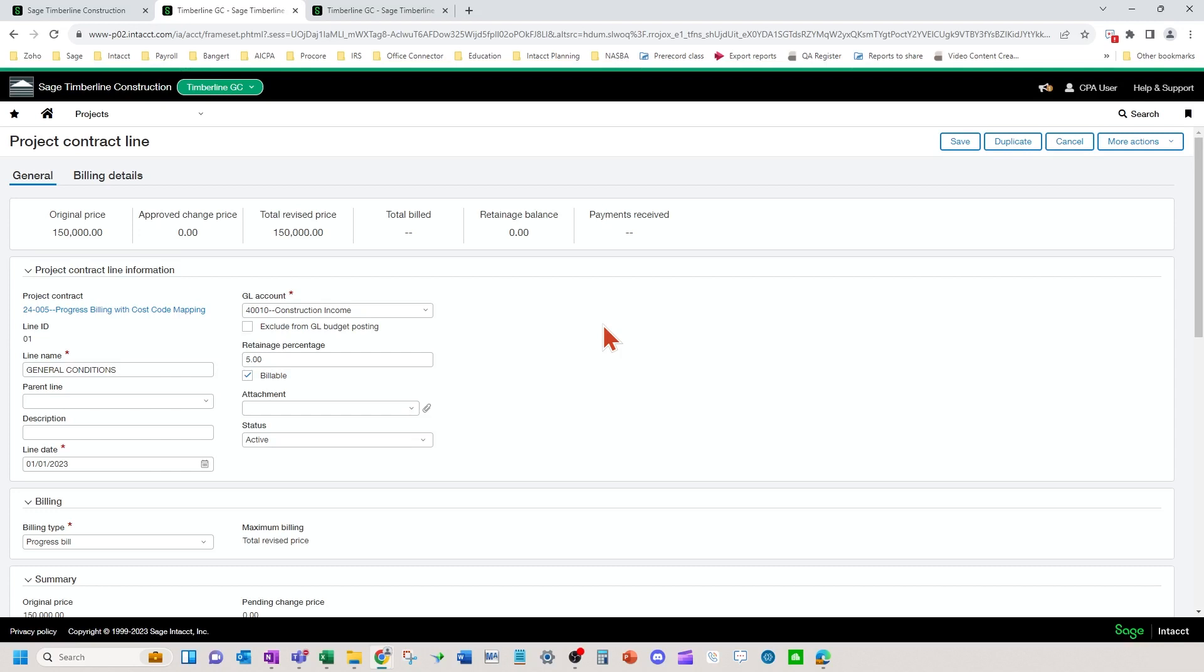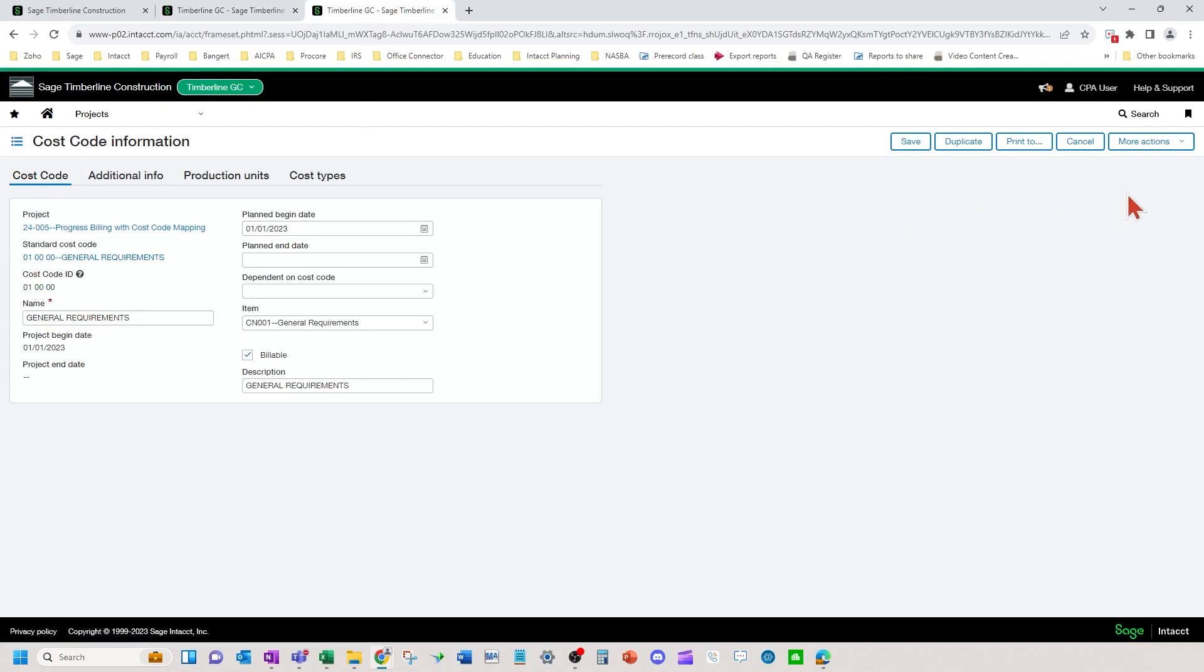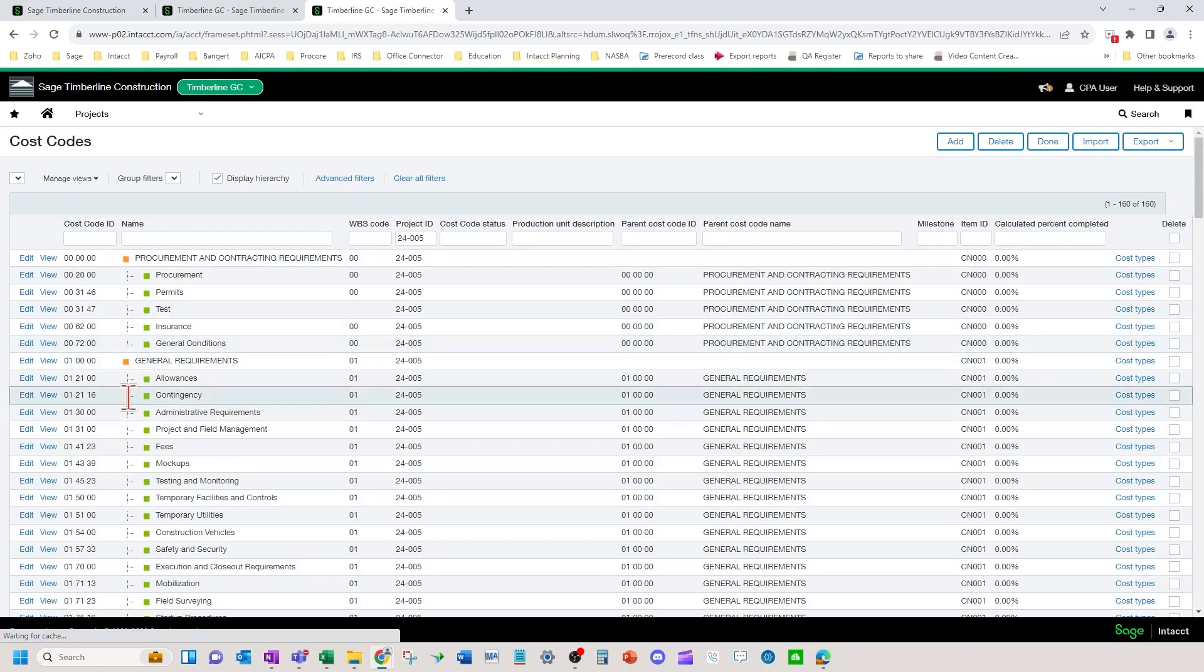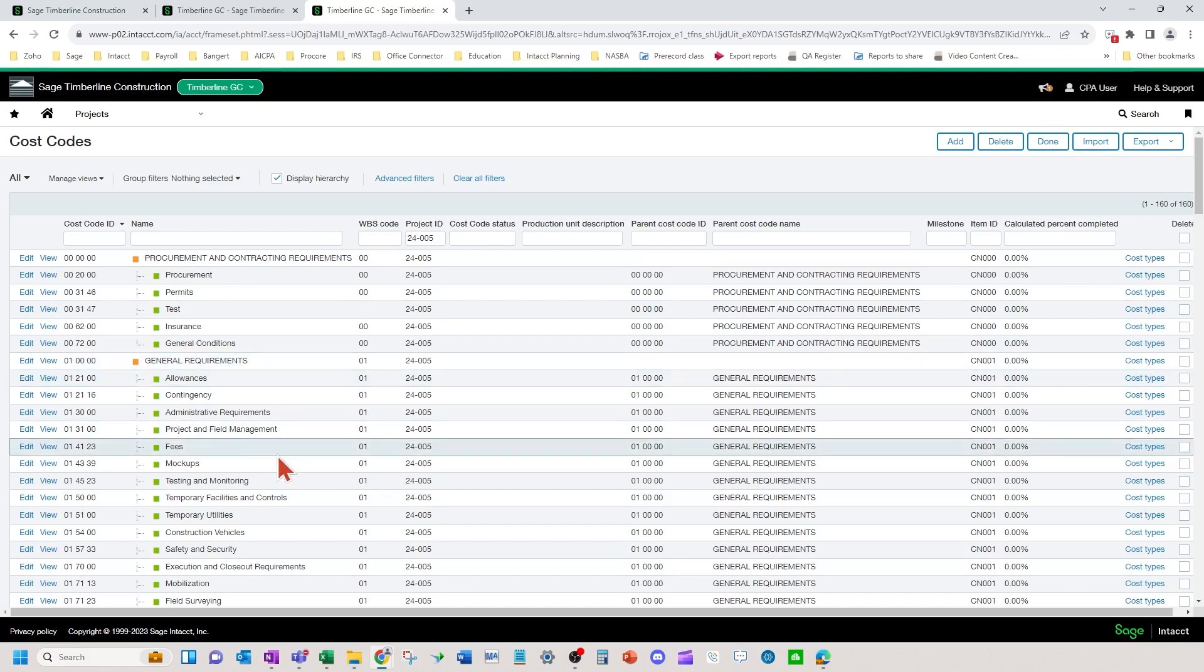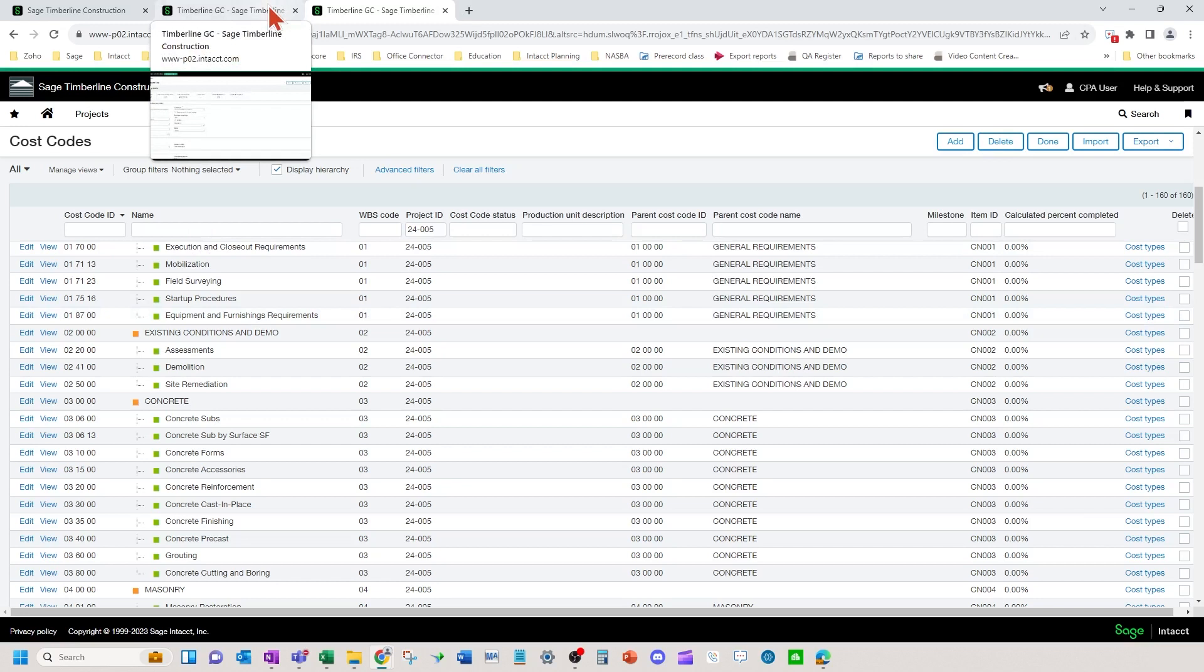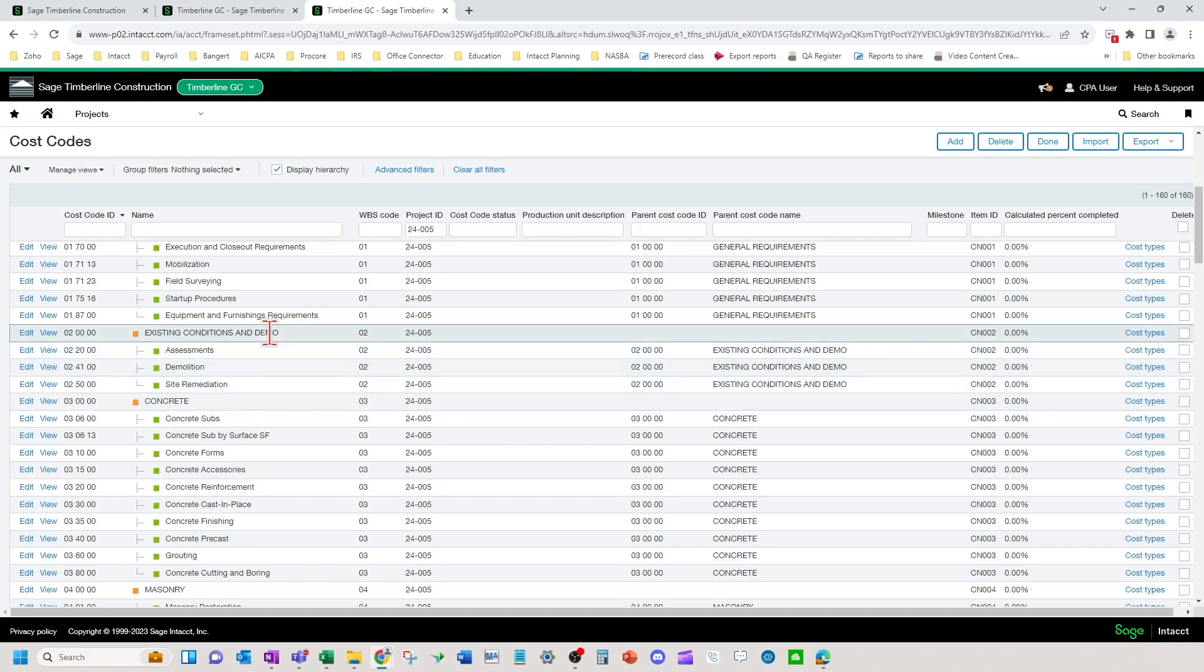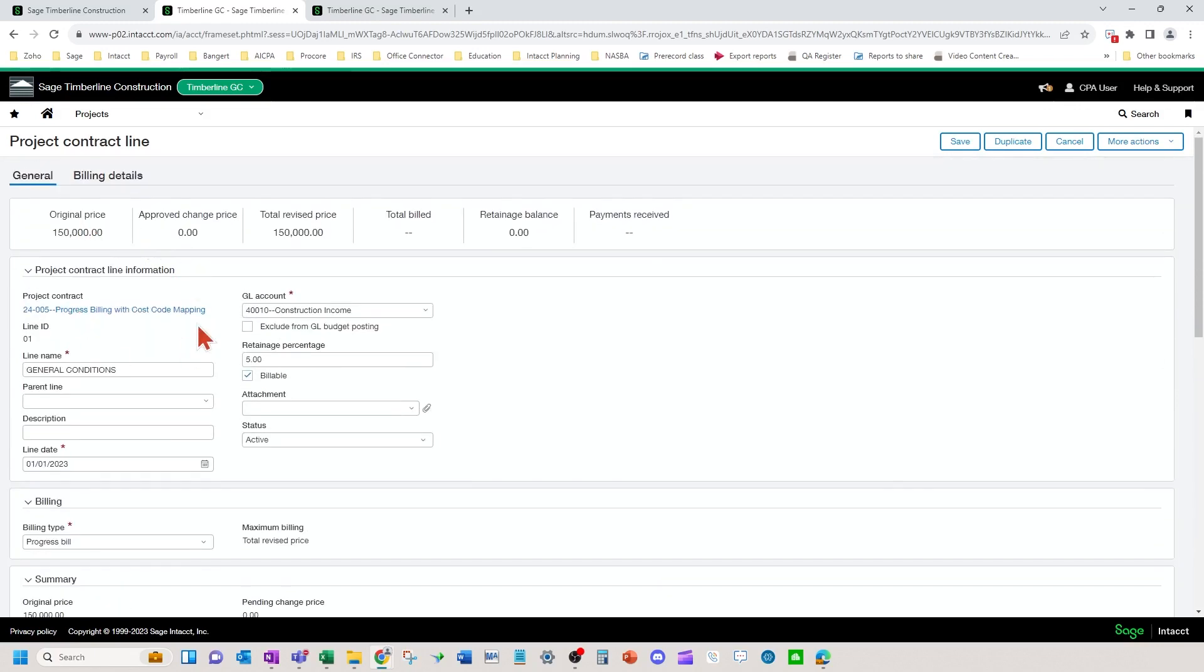So let's just say for simplicity purposes that all of the 01s, all of the 01 child cost codes, so the detailed cost codes roll up into 01 general requirements on your schedule of values. So the 02s would then roll up into the 02 line item on your schedule of values. In order to get the report to work the way that it has been built, the WBS codes need to be on the parent level. You don't necessarily need to put them below like they show here. You just need to get it on the parent level. And then you will need to put that parent cost code here on the contract line.